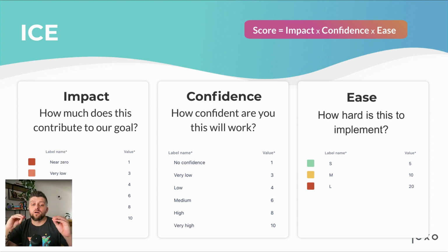So basically, what is the reach of this change? Let's put it like that. You can have wide reach, or very little to no reach, in terms of, potentially, customers. Let's say the customers that are affected by this change. And then you have also weighted shortest job first, which is more of a safe, larger organization type of prioritization approach or method.